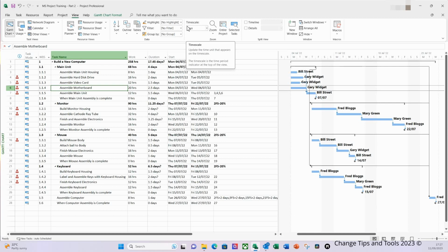Now I need to assign my project manager to the project. However, Jane is not directly responsible for any of the tasks, and she also oversees multiple projects with 20% allocation, i.e. 1 day a week to these projects, and also to this project. Now, some people tackle this by adding a project task to the project and assigning the project manager resource to that task.